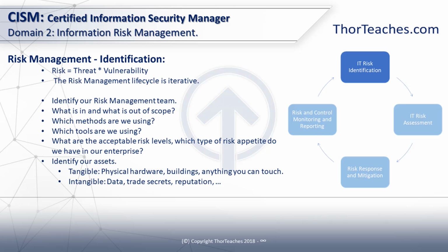And if you're familiar with PMI's project management methodology and life cycle, then you know the first phase, initiation, is where we identify our team, and we identify team members from across the enterprise. If we have too narrow a scope of stakeholders, we might miss some of the big risks. So we need someone from the entire enterprise, and we need someone who's allowed to make decisions. We're not okay with them just sending someone random because they have to.